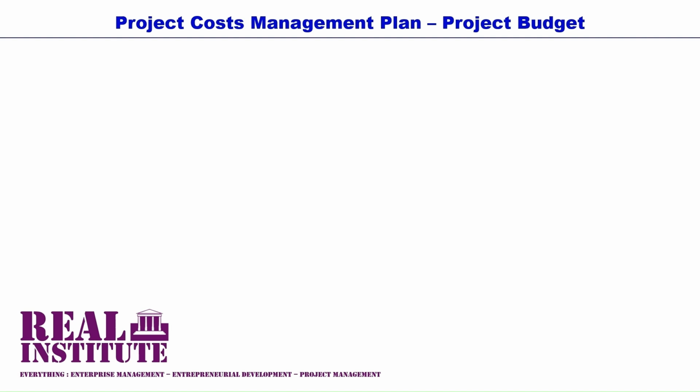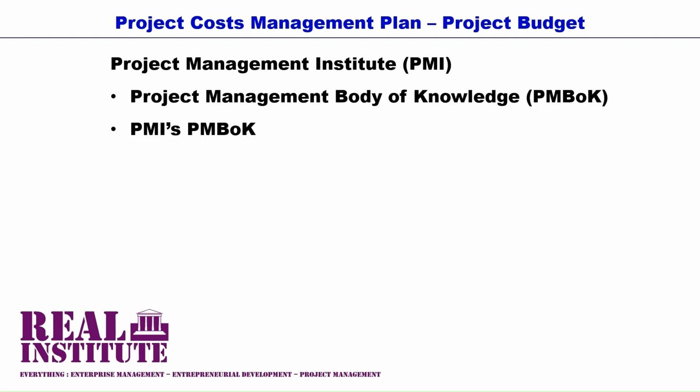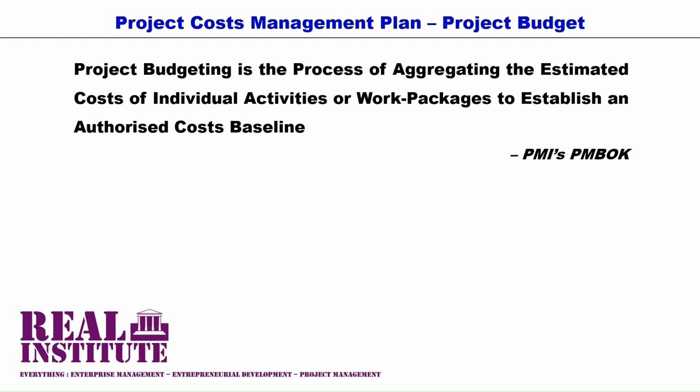According to the Project Management Institute, PMI for short, the seminal project management standard that is universally acclaimed is called the Project Management Body of Knowledge, PMBOK for short. Therefore, according to the PMI's PMBOK, project budgeting is the process of aggregating the estimated costs of individual activities or work packages to establish an authorized cost baseline. The key benefit of this process is that it determines the cost baseline against which project performance can be monitored and controlled.